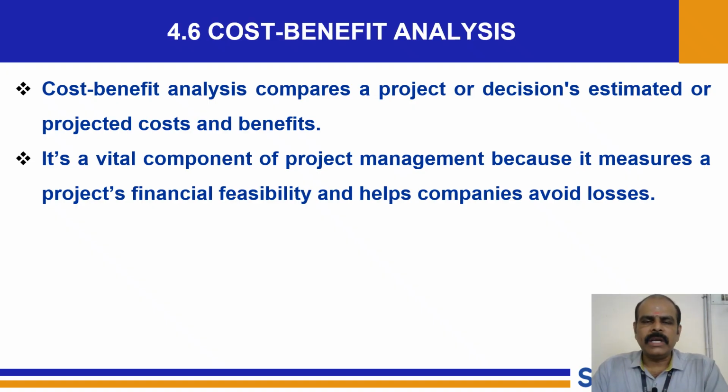So now how it is going to work is, it is going to be purely from the finance perspective. So first, the finance perspective is, when I want to buy a Siemens, what are all the associated costs? We need to identify them right from the beginning. Then similarly do it for the Fanuc controller. Then what benefits do we gain out of it? Then substitute everything in the form of a formula. Get the NPV value, net present value. Then get into the very important concept of calculating the ratio, the CBA ratio. So which one is good? We select that. So that's how we are going to do it. See, it does not mean that only when there is a tie should we use it. No, these are multiple tools. Any tool can be used at any point of time. Okay.